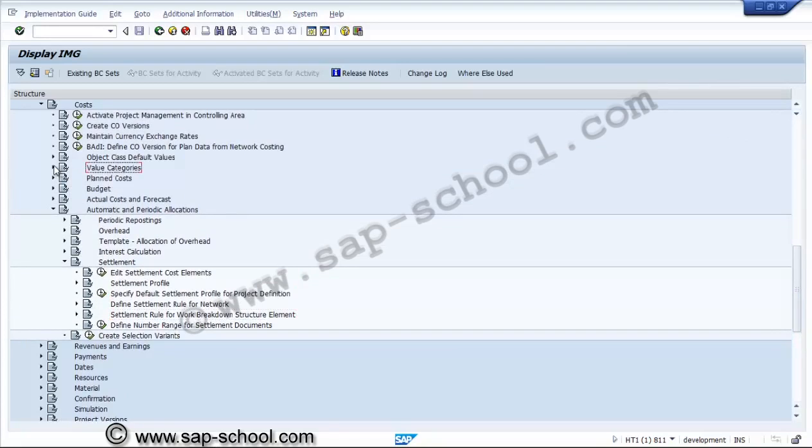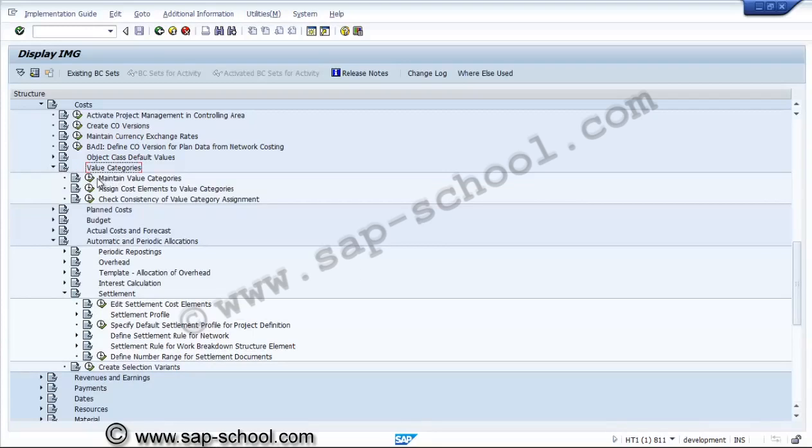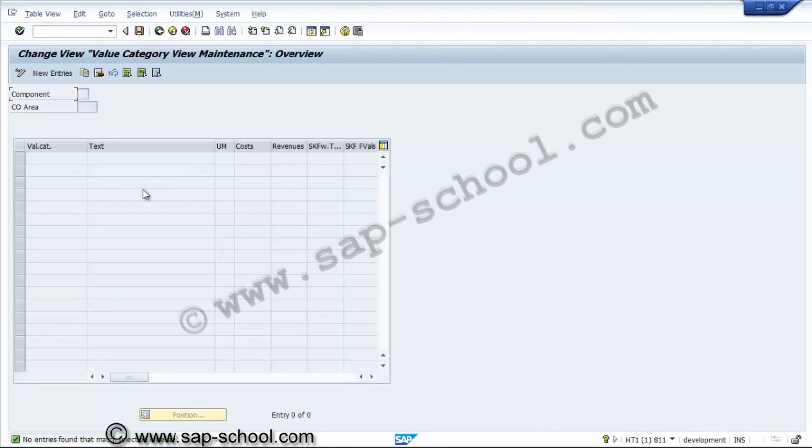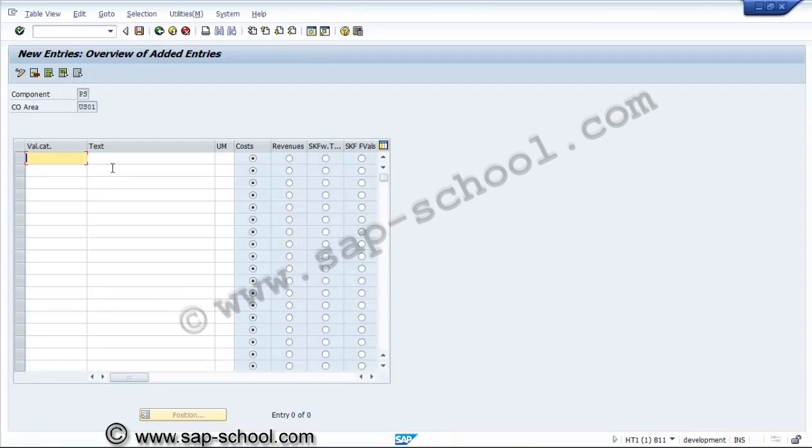value categories. Under value categories, you see what value categories are created for the project systems. The value categories consist of an interval for one or more cost elements, commitment items, and statistical figures. So here we will create some value categories like PO01, non-aggregated POC.